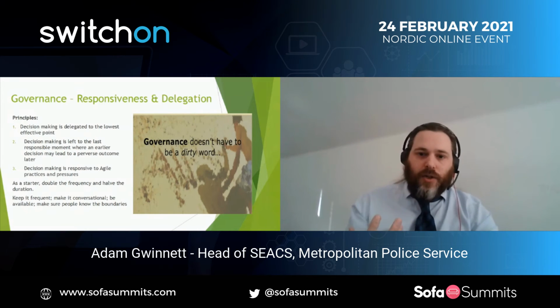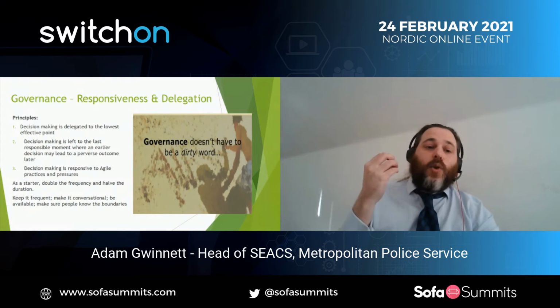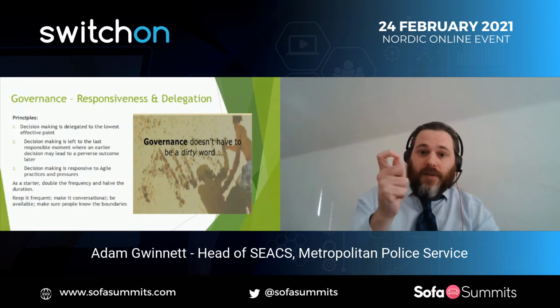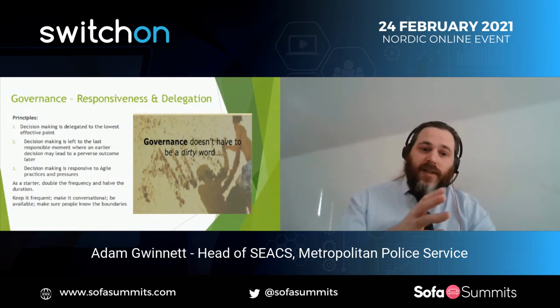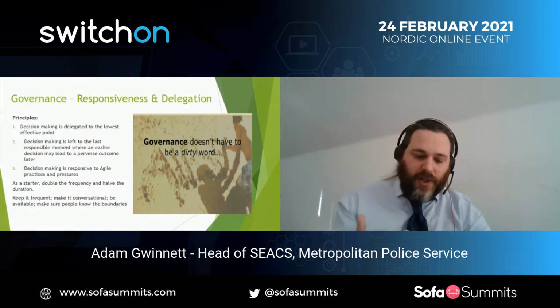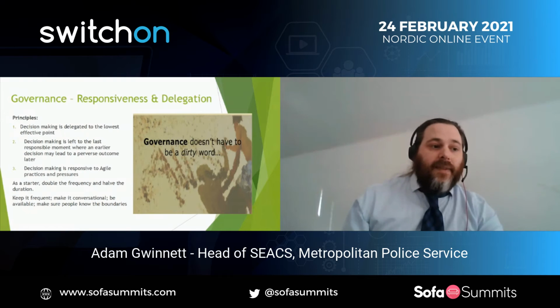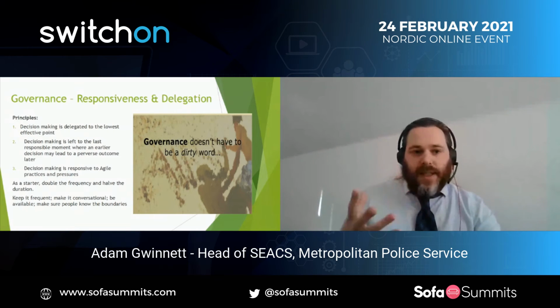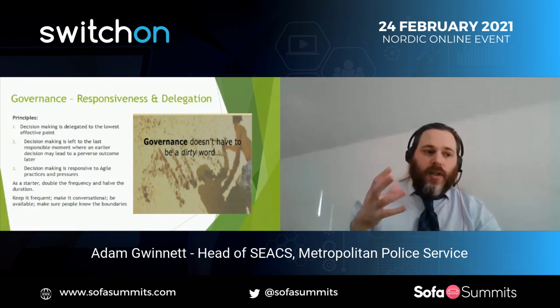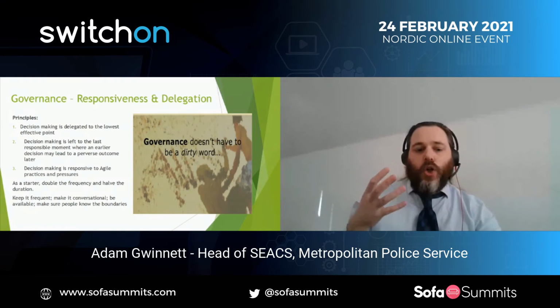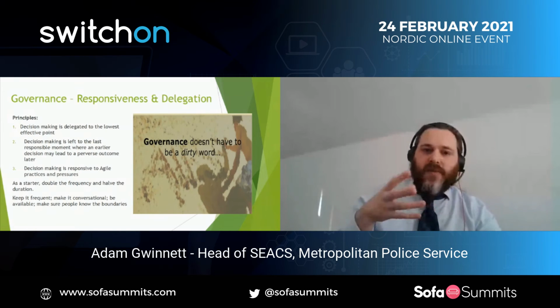So you allow them to schedule themselves in, but you say, you can talk to us for no more than 10 minutes. And if you're aiming to get a decision at the end of it, you have to make sure those are the pertinent ones. We can't have 10 minutes of background and then 30 minutes of discourse. And again, I think that breeds the right behaviors in the delivery teams, but also really focuses you from that EA point of view on what the key value points are in terms of supporting the decision.